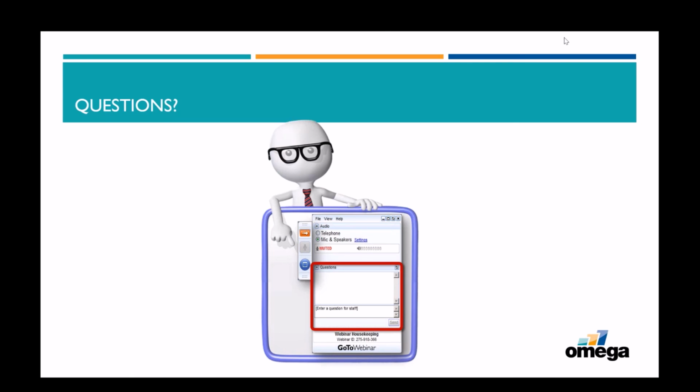And on that topic, there are also questions about currencies. We can use different currencies within the same project, and Pims will then use the exchange rates to bring them over to your reporting currency and then normalize it from there. You can also do the normalization in the transaction currency. And of course, we store the currency exchange rates by year to capture all the historical data.